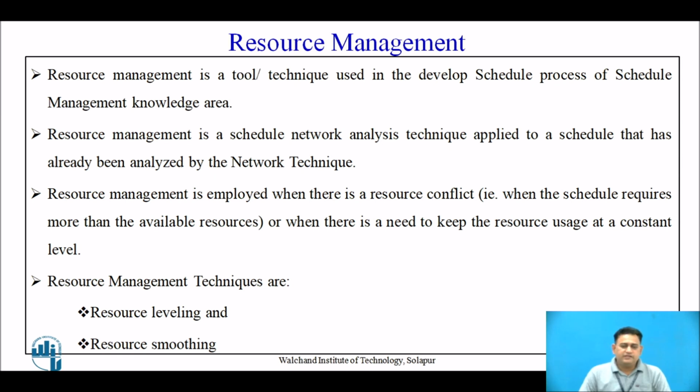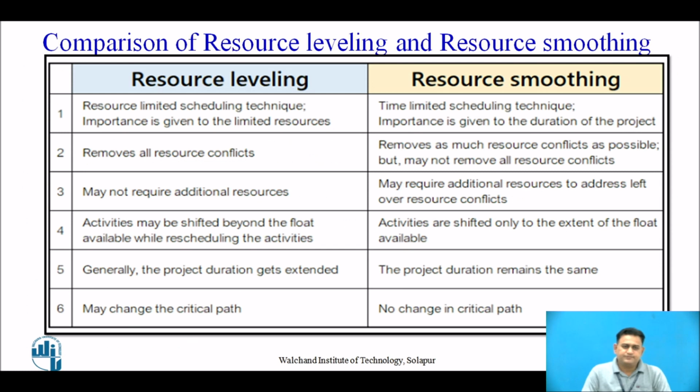But before that, in today's session, we will see what exactly resource leveling and resource smoothing mean. The comparison of resource leveling and resource smoothing. These are the two techniques. Much more important is to know what terminology or factors are associated with leveling and smoothing. In leveling, resource limitation is there, so much more importance is given to the limitation of the resource. In smoothing, the time limitation is much more important, which means that the resource limitation is not important, but the time limitation is.